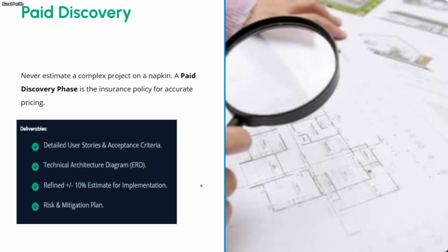Discovery, this is just one aspect which I wanted to touch base on. Sometimes it becomes important to do a paid discovery. It happens that you do your requirement gathering sessions, your discovery sessions, and you tell the customer you will do it for free, but you end up spending a lot of time and effort building the user stories, writing the documentation, and so on. You spend a lot of effort but you're not paid for it, and then the project doesn't come to you.